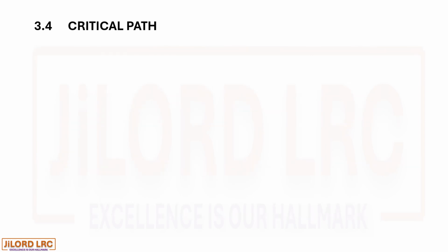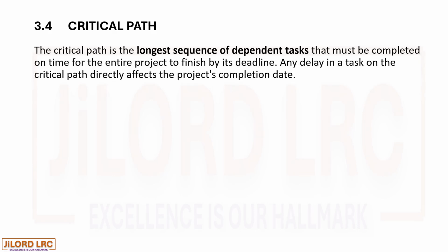Critical path. The critical path is the longest sequence of dependent tasks that must be completed on time for the entire project to finish by its deadline. Any delay in a task on the critical path directly affects the project's completion date.